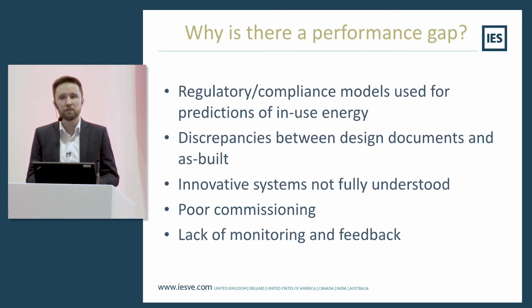As well as that, the performance gap was caused by other issues related to the construction industry, so discrepancies between design documentation and what was actually installed and built, new and innovative systems being poorly understood by designers and installers, poor commissioning or a lack of commissioning, so insufficient budget being allowed for commissioning of the building systems, or insufficient time being allowed when project timescales were squeezed.